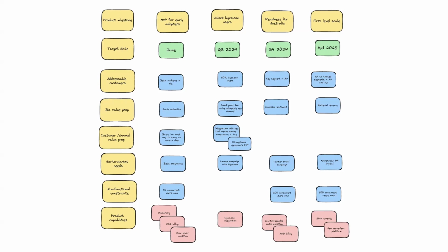So rather than deciding A is more important than B or B is more important than A, let's agree what set of questions, experiments, whatever it is. If all of those things are true, that means B is better than A. So let's at least agree what the criteria are to make the decision, and then start working our way through that, rather than just straight up making the decision on the basis of one person's opinion or two people's opinion. Right.